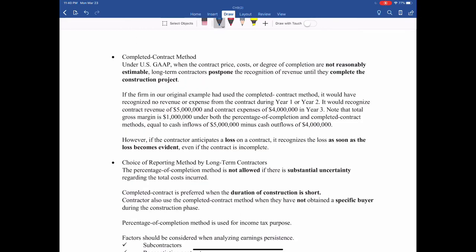The next method is the completed contract method. Basically, you just recognize the revenue when the project is complete. For the same example, there will be no revenue and expenses recognized in years one and two. When it is complete in year three, the contract will recognize $5 million revenue and $4 million expense.